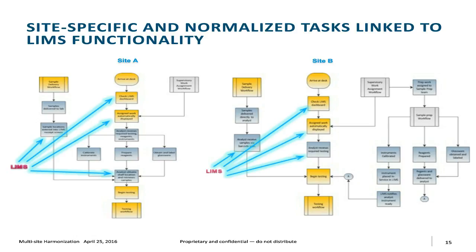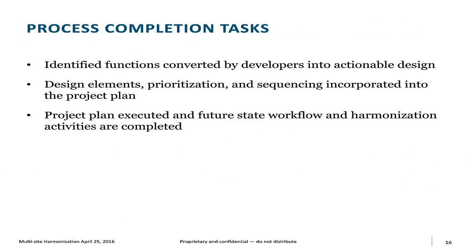You're looking for all of these different abilities to apply LIMS to alleviate certain problems. You're looking for those areas that have nothing to do with software whatsoever for process improvements. And so at the end of the day, when we go across all of those organizations, we're able to prioritize those things that bring the greatest business benefit to a company. And we can then sequence them into the project plan so that those things that should be in phase one are done in phase one. Those things that can be pushed to later phases can be pushed off to those phases and executed when the budget becomes available or whatever for those things.